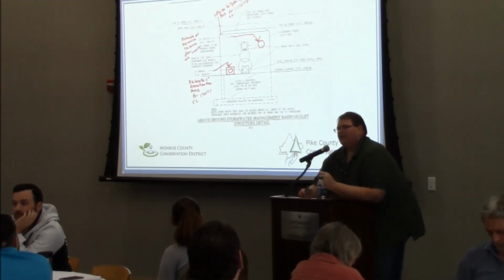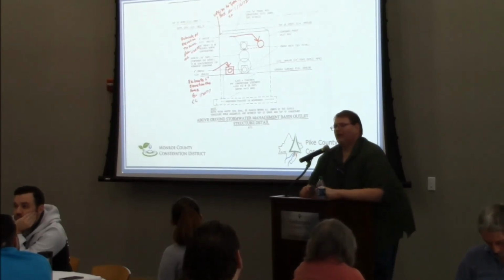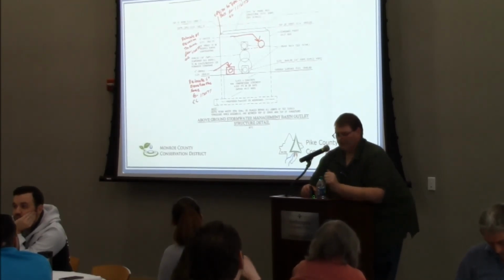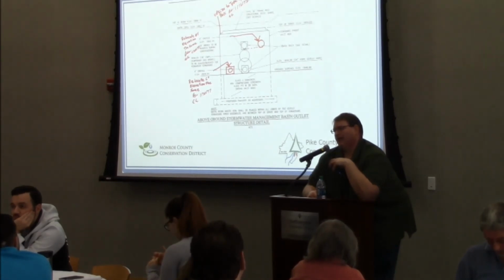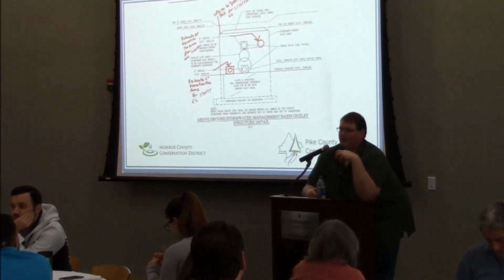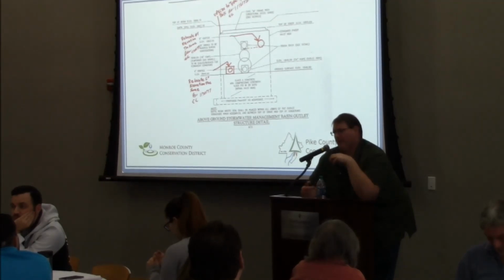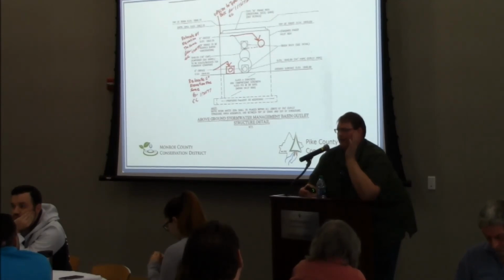Oh, here we are, the friendly snowman, also known as an outlet control structure. So a lot of times we'll get questions on this. Can I shift it over here? Can I shift the orifice over here? Can I move it this way a little bit, that way a little bit? And as long as you're not changing the inverts or the size, generally you can shift it around the outlet control structure without having any significant impacts on your routings.